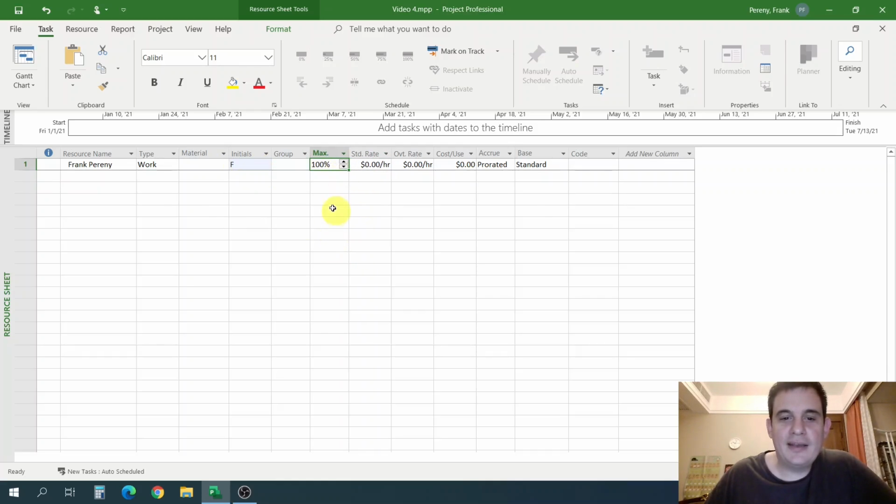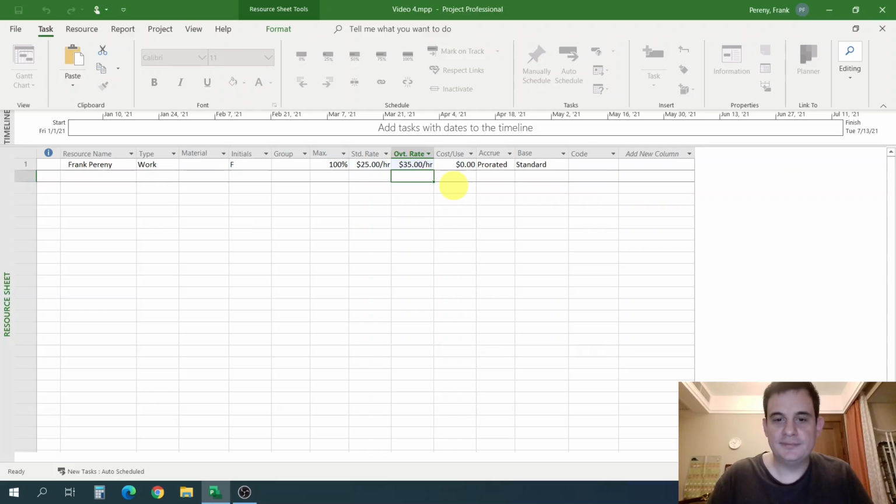Okay, then there's a max column, which I'll talk about in a minute. But Frank is a certain person working on my project. He's a work resource, and he has a standard rate and an overtime rate. So maybe my standard rate is $25 per hour, and my overtime rate is $35 per hour. Okay.